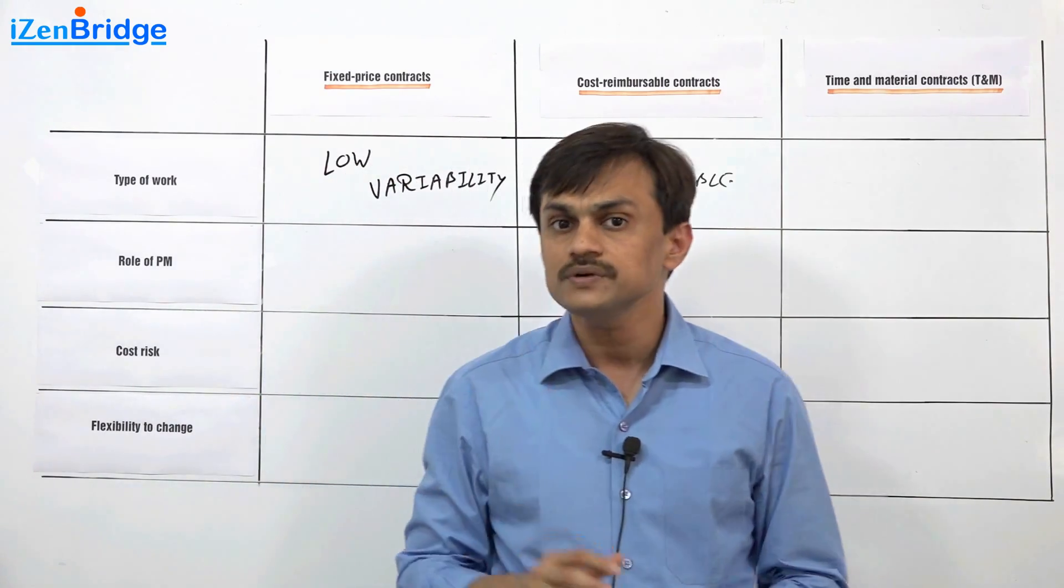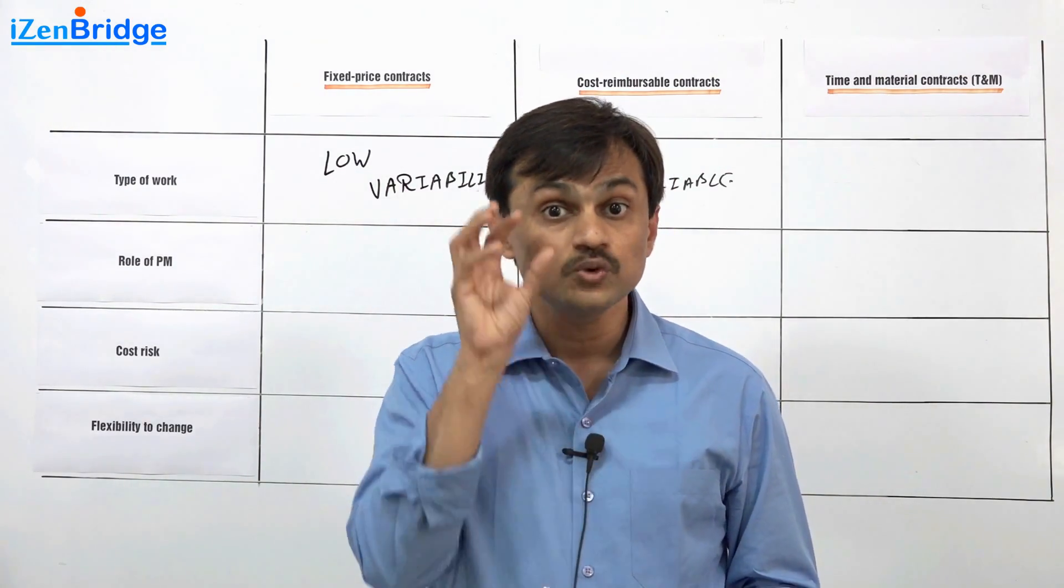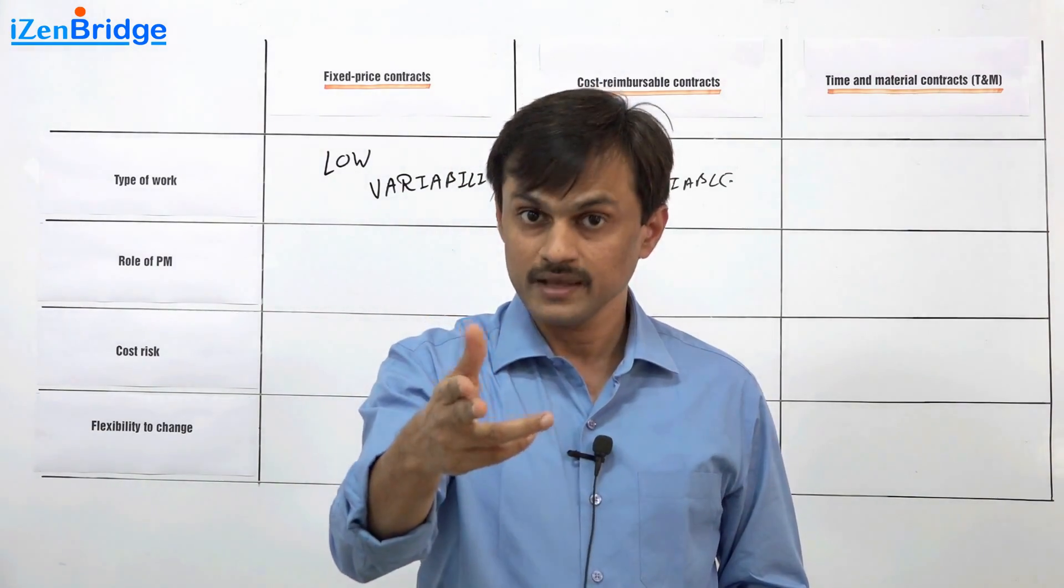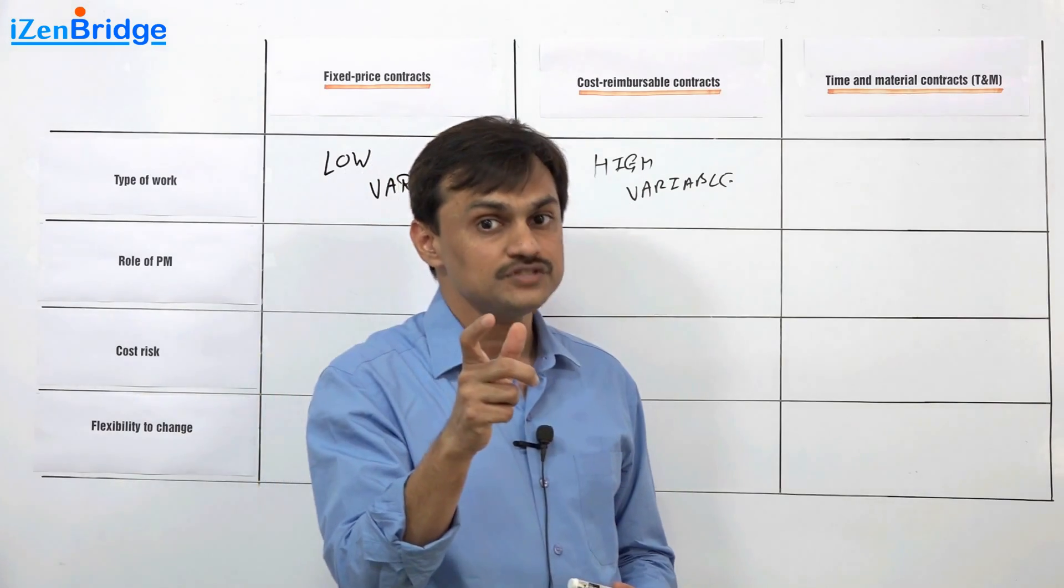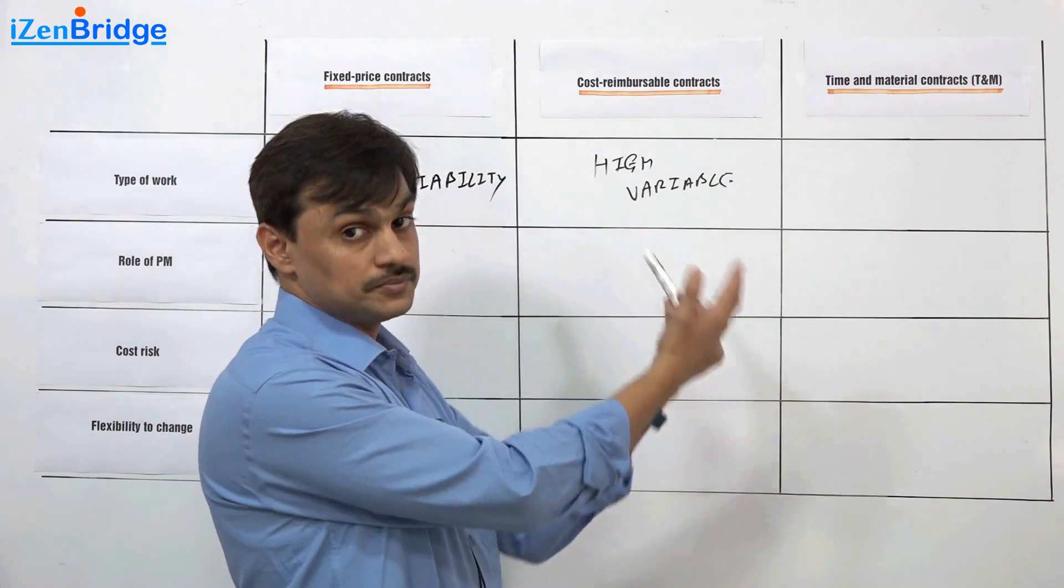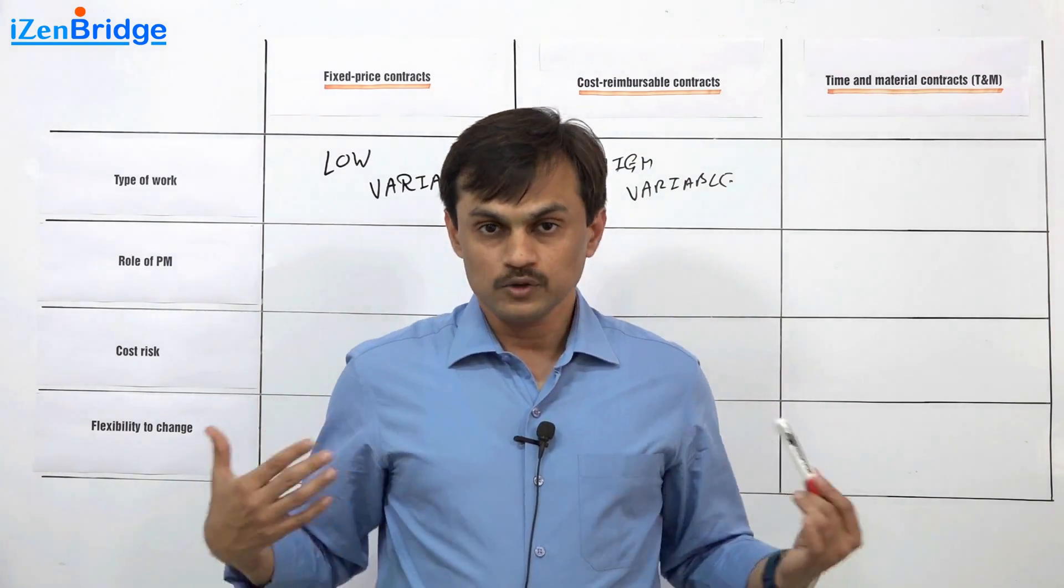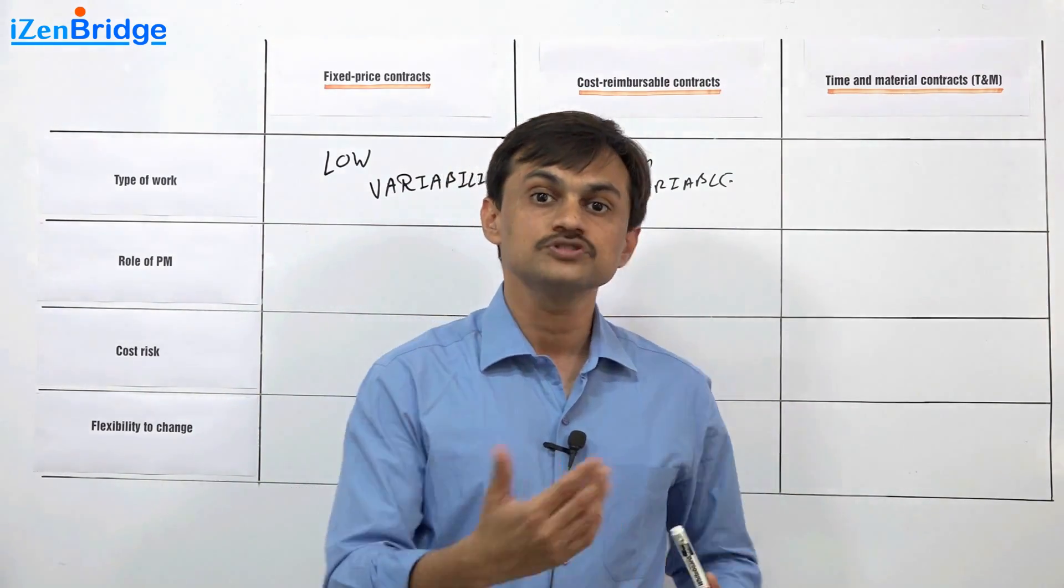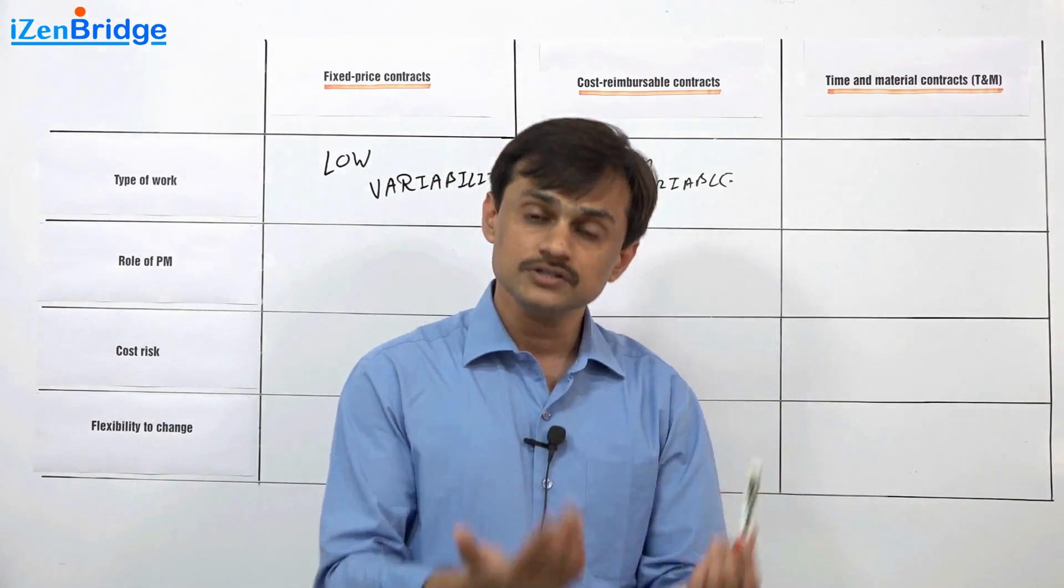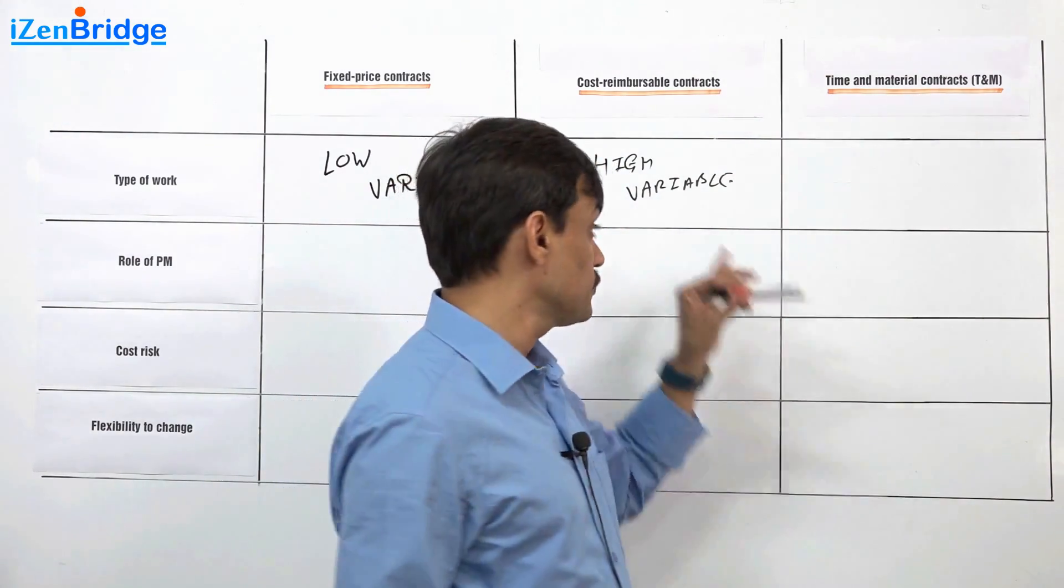When we get into a cost reimbursable contract, usually the idea of a buyer is not to get something in a bare minimum cost but to get the goal achieved even if in between the direction changes multiple times. And that is why in order to provide that flexibility of change in direction, in order to accept the variability, high variability work goes into cost reimbursable. Which makes the seller also relieved that both of us are on the same boat. If buyer likes the proposed solution, the buyer will pay for it. If he does not like it, I will find another solution and this is how we will go forward.